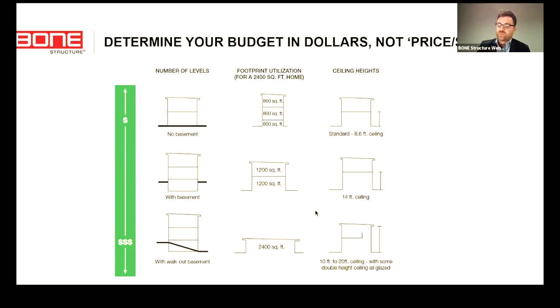But a couple good examples here on why price per square foot doesn't work. The finishes can drastically change price per square foot. $50,000 kitchen versus $20,000 kitchen. You didn't add in necessarily any more space to that kitchen. You just went with a higher end kitchen. So a $30,000 delta on the same size home is going to increase your price per square foot. Are you getting ripped off? No, you're getting different value in the dollar that you're investing.